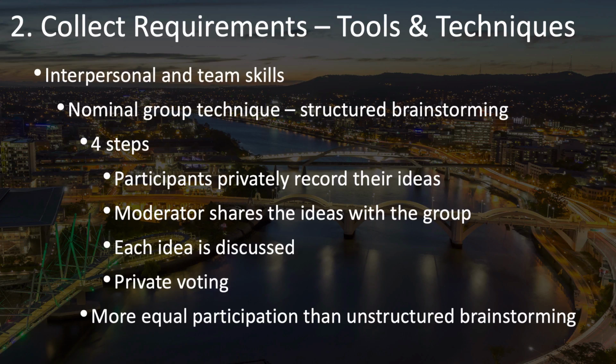The first is that you'll pose the idea or the question or problem, and each of the participants will privately record their ideas. Then in the next step, the moderator or facilitator shares all of these ideas with the group. Each idea is then discussed and clarified, which may include grouping these, such as in an affinity diagram or mind map.